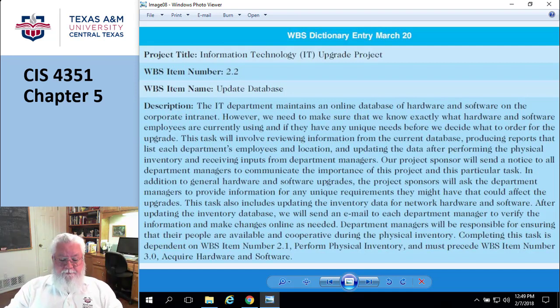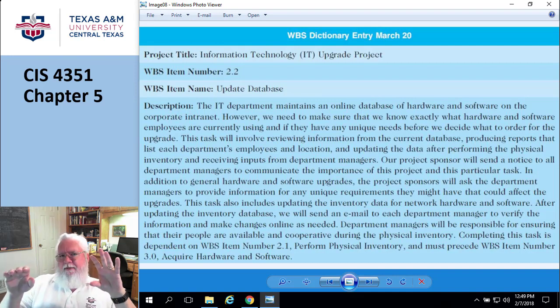Okay, so let's talk about validation, since that's really what this paragraph is about, not about scope creep. Validation. So this is the formal acceptance process. If I have a completed deliverable, I need to validate that part of the scope saying, yep. Now remember we talked about when you're putting together a WBS, maybe not at the individual task level, but maybe at the level 3 or 2, there ought to be some way of testing that you actually did what you said you're going to do. How do I know you met the requirement?